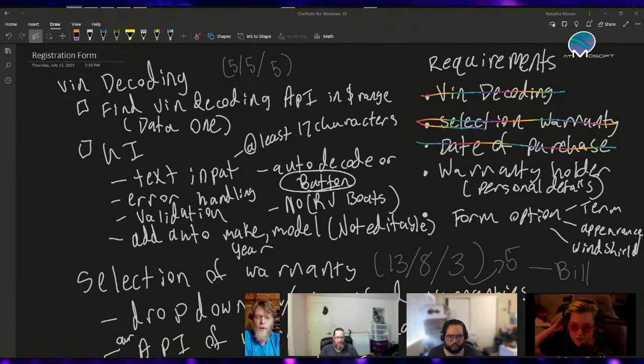Yeah. All right. One thing about the hour estimation, real fast, just because it's incredibly related, is that I prefer to go with each individual who is accomplishing the work instead of trying to make some estimation based on a complexity number, because just because it's complex doesn't mean it's not fast. Just because something's simple doesn't mean it doesn't take an incredible amount of time. Yeah, a lot of code. Yeah, that's good.